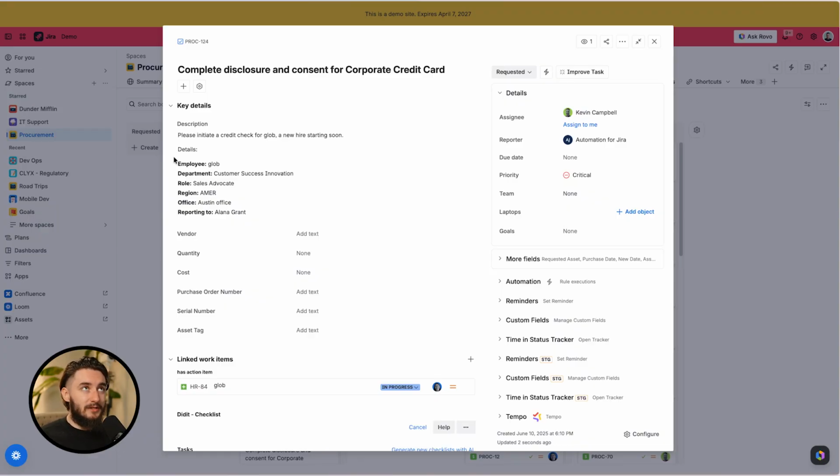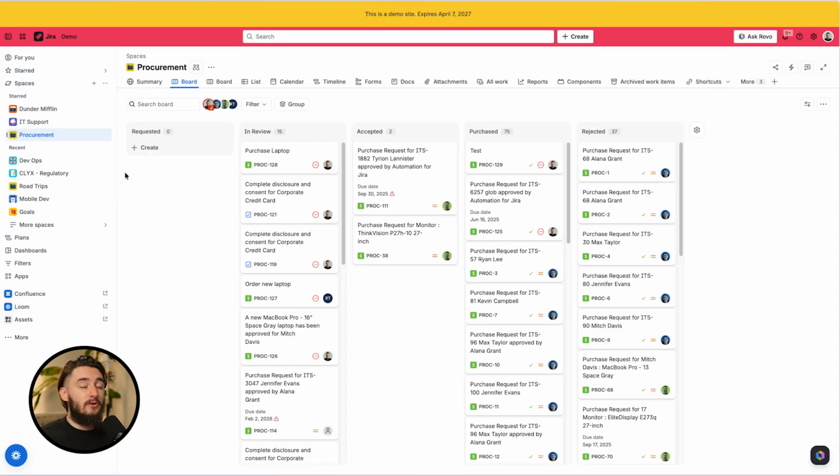And the other thing that I like to lean on automations for is for your processes or your workflows. So one simple example of that is an onboarding. Let's say you're onboarding a user, or an employee, and you need to do a select number of things to onboard that employee. Well, you can create an automation with a parent task that says onboard person, and then spin up and generate a bunch of subtasks that roll up into that parent task on what you actually need to accomplish. So it's essentially creating sort of a checklist for you that you can then track in Jira and then mark things off as it goes.